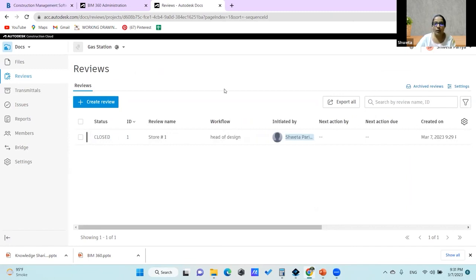So rather than, like when you send out your submissions to your jurors or your faculties to take out the prints, you do all of that, this is a very automated and a very controlled process, where even if I add 2, 3 approvers, approver one approves it, it goes to approver two, then he approves it, it goes to approver three, then he approves it, and then the final approval is there. So this way I have it documented.